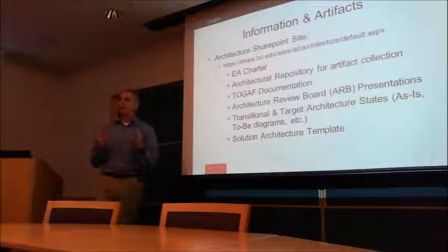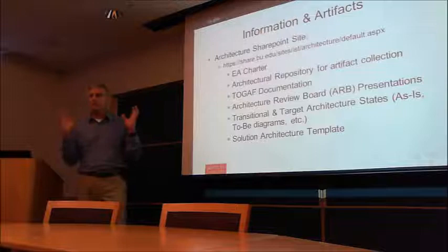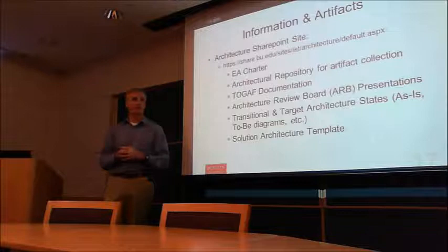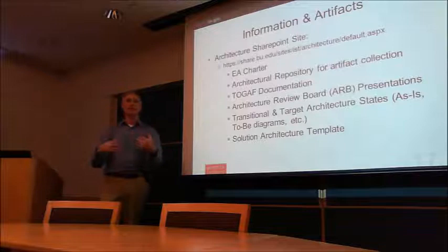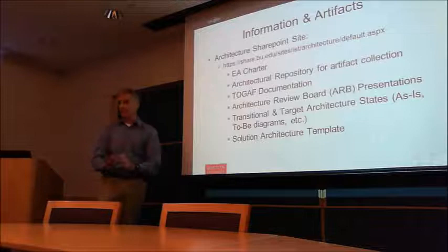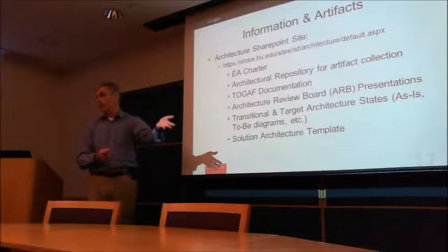A good example is the student information system space. On the mainframe, that's about 15 plus individual applications. When we were doing the Workday project, there was a question of whether Workday would be a student information system, and what that means from a BU perspective. So we had to go in and start to map things quickly, because I wanted to say, okay, this is in scope for Workday if we go down that path, this isn't, this is a gap, and this is something we've got to account for.